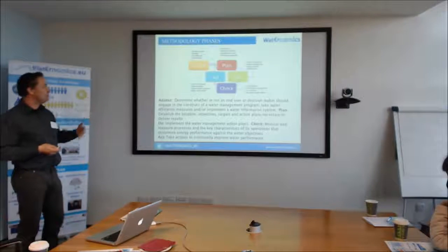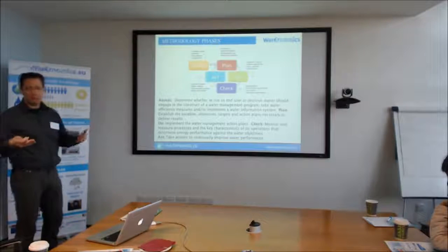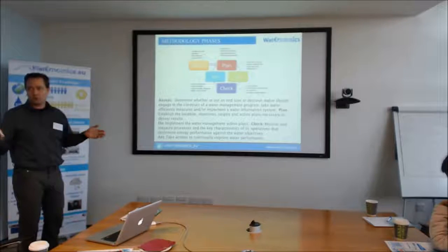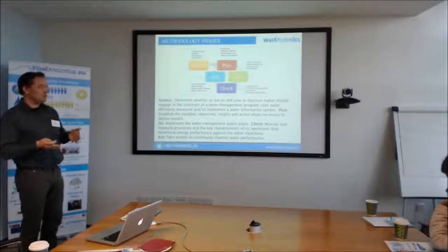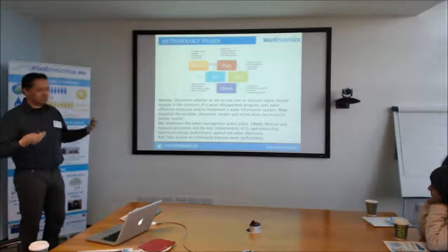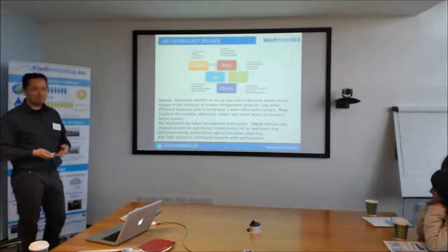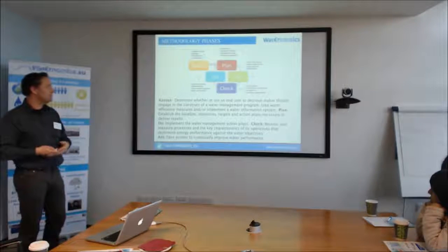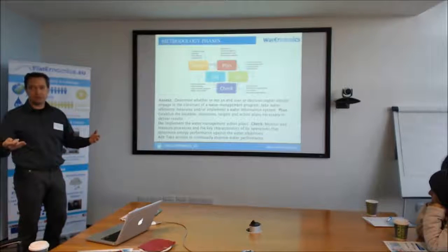If that's all said and done and you've set the stage for the improvement actions, you can start. You plan your action, you make detailed plans of what you want to reach, and you do baseline measurements. If I have 50% non-living water today, what's my goal? I want to go to 45%. So you need to measure today and you need to set your goals. Doing is just doing what you're planning to do. You implement monitoring systems, you implement metering systems, you train your staff, you communicate what you're doing, and you involve end users.